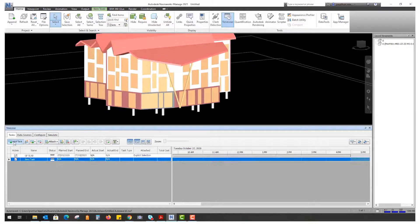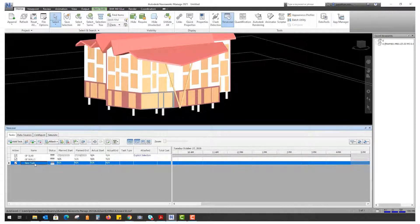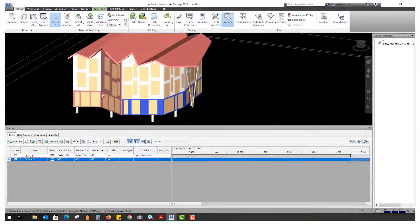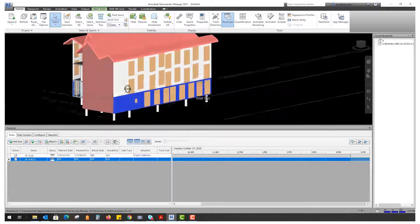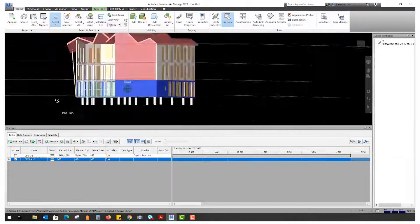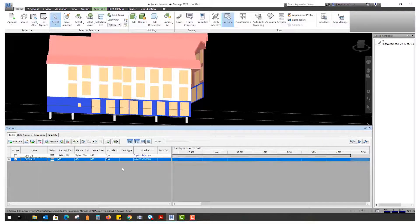Now we'll add a second task and rename it 'ground floor walls.' Keeping this simple to explain the principle. I'll select some of the ground floor walls by left-clicking and using the Control key. Then right-click on 'ground floor walls' and choose 'Attach Current Selection.' I'll assign a planned start date of the 28th and end date of the 28th — a very fast form of construction we're working with here.